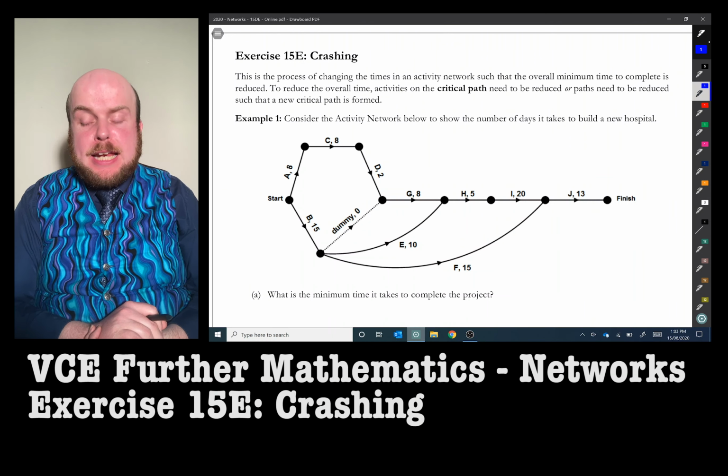It is ideal here to do a back scanning, as well as to look at how much needs to be reduced in order to get each of those new junctions to work. Just a reminder, the numbers in green are the new calculations to get to 46. So let's start from the very end. We've got finish, we've got 46, and then we get to this junction J, this 33 and 25. These were new numbers based on a reduction here.